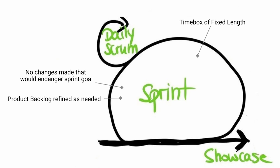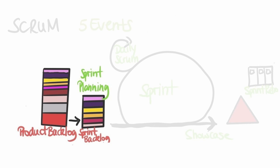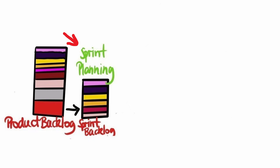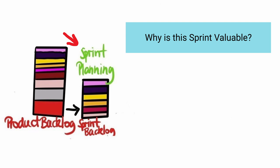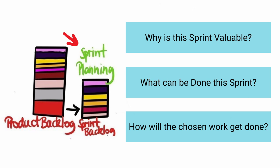Sprint planning initiates the Sprint by laying out the work to be performed. The resulting plan is created by the collaborative work of the entire team. Three questions are asked: Why is this Sprint valuable? — the product owner proposes how the product could increase its value and utility; the Sprint goal must be finalised prior to the end of Sprint planning. What can be done in this Sprint? — the team selects items from the product backlog depending on capacity and prior experience. How will the chosen work get done? — for each selected backlog item, the team plans the work necessary to create an increment that meets the definition of done. The Sprint goal, selected product backlog items, and the delivery plan together form the Sprint backlog. Sprint planning is usually time boxed to a couple of hours.